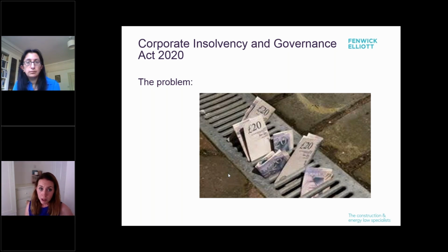However, if you stop supply or you leave site, then you're facing some significant adverse repercussions. You could find that you're paying damages for delay. If you're under delay obligations and you're not meeting those progress milestones, then you are likely to be liable for delay. It may be, if your default is serious enough, that you are going to be liable for repudiatory breach and the customer can claim damages from you. Or you could find that you fall foul of another new provision from this Act, which is that suppliers may not do any other thing on the grounds of the customer's insolvency, which is slightly too wide for us to cover in the time we have available this morning. But what it means as a package is that as the supplier, you've got to keep going. Otherwise, you are facing some significant risk.